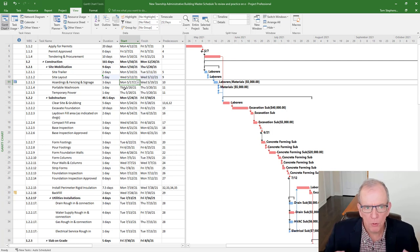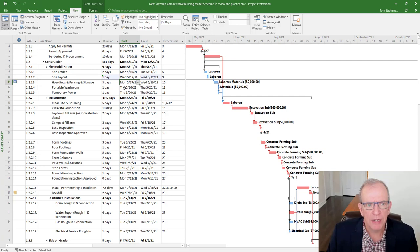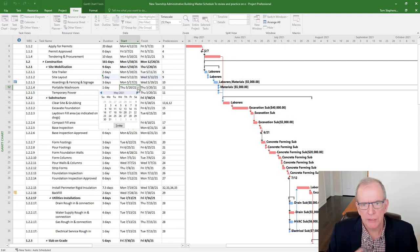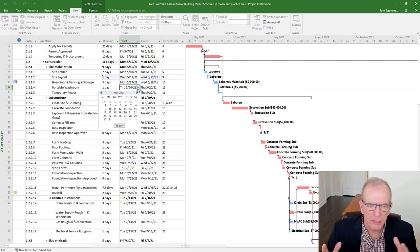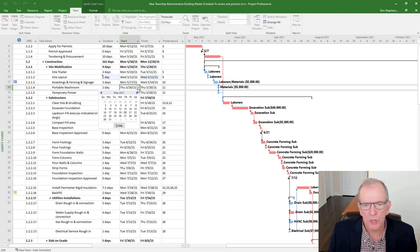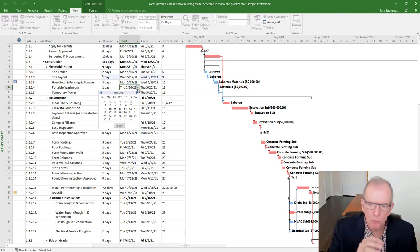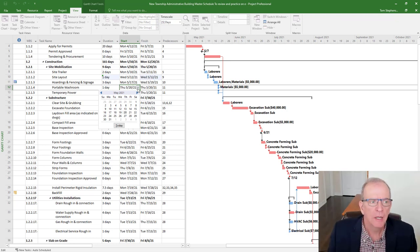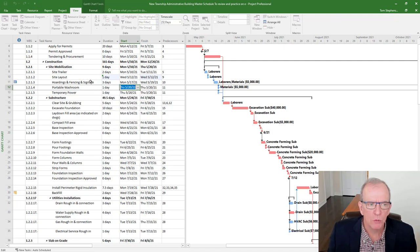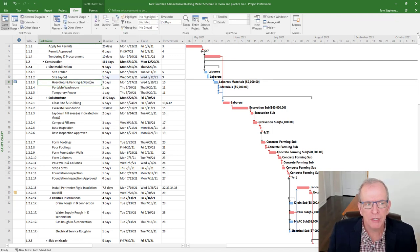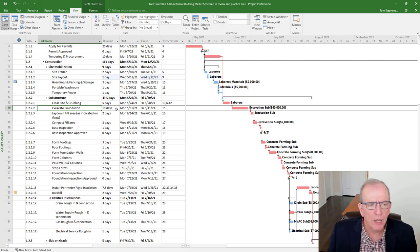So I know people, a lot of students and a lot of industry people that I've worked with, who maybe didn't have any training in this way, they find that, oh, wow, I can click dates. This is cool. I can click whatever dates I want, and then that'll set up my schedule. The problem is depending on the constraints that you put, you're locking things in. It maybe can't move forward or it can't move backwards, or it has to be on that date. There are a lot of different constraints. So you don't want to do that.